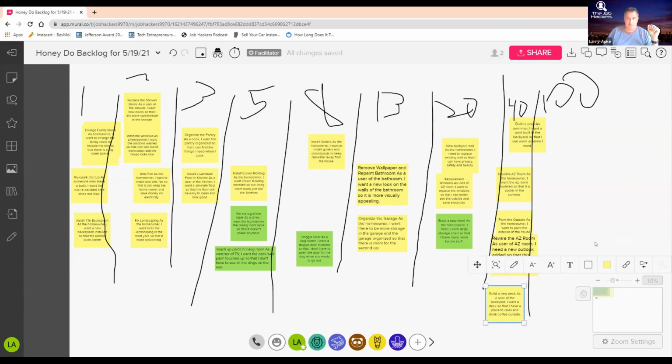So my product owner gets some people together from the business maybe, or sometimes I do it just with the product owner because the product owner feels that they know it well enough. And I'm going to ask a different question. Instead of asking how much effort would it take, I'm going to ask, if I delivered this piece of work today versus this piece of work today, which one brings more value? Really simple question. So you end up doing the same exercise, but asking a different question about value. Now I have the two things I need to really understand which are the most valuable things I can do in the shortest amount of time.